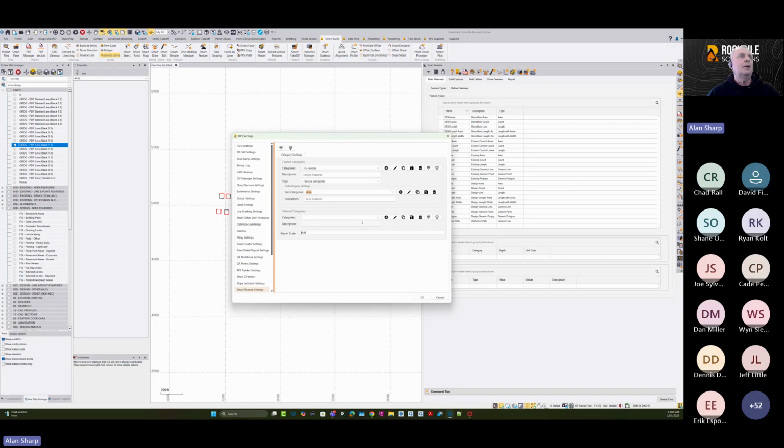And then beneath that, you have the material categories. And material categories are things like aggregates, composite materials like asphalt, concrete, concrete reinforcement, which would include things like rebar, tie bars, dowel rods, dowel baskets, things like earthen materials, which would be your topsoil, soil, rock, and then things like earth and select would be other aggregates that you buy or other materials that you buy, which you'd put into the select category. Geosynthetics for materials like membranes and geotextiles. Landscaping, which would include things like sod, seed and mulch, hydroseeding, that kind of thing. And then other materials are just others that don't fit into these categories.